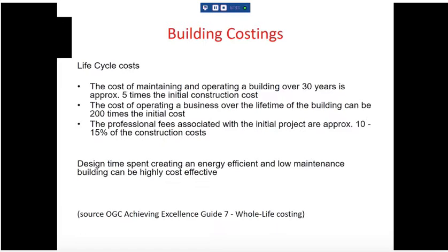So there's some stats for you, which may or may not be surprising. I don't know what other lectures you've had in these areas. The cost of maintaining and operating a building over 30 years is 5 times the initial construction cost. Okay? Now, why is that interesting?